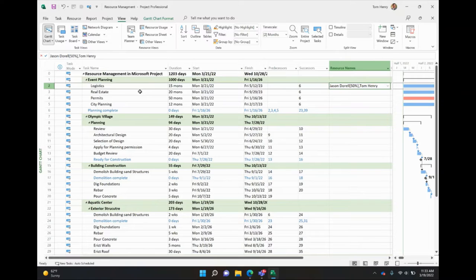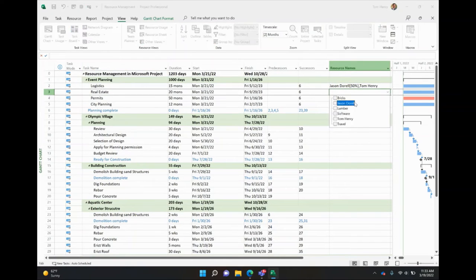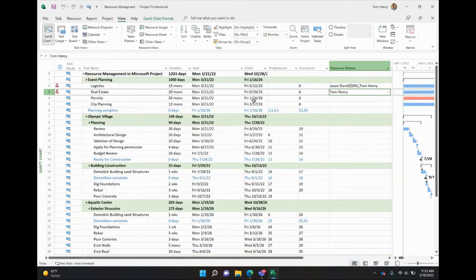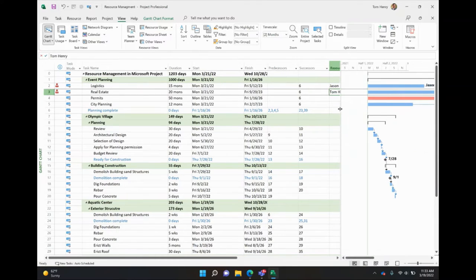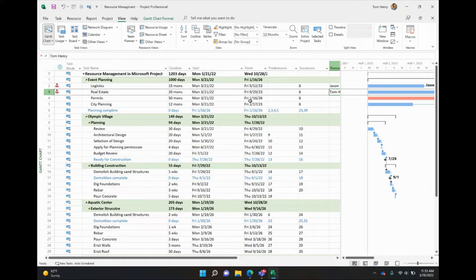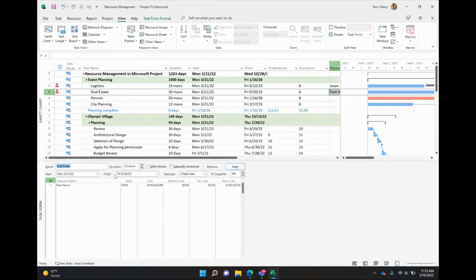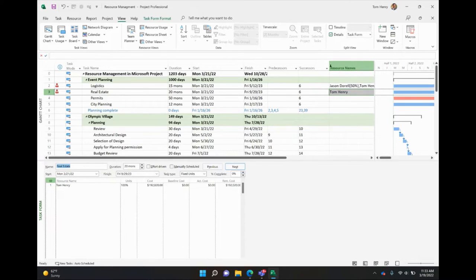You can see if I expand this out that Jason is only working 50%. That's because his max units are 50%, whereas Tom's working full time. For real estate, let's do something similar. We can come in here and we'll just assign Tom. Great. Now, when you do that, you can see I'm now becoming over allocated because these tasks were working side by side. So if I make Tom Henry 50% on this task and 50% on the other one, we should be good. Let's have a look at how we would do that.